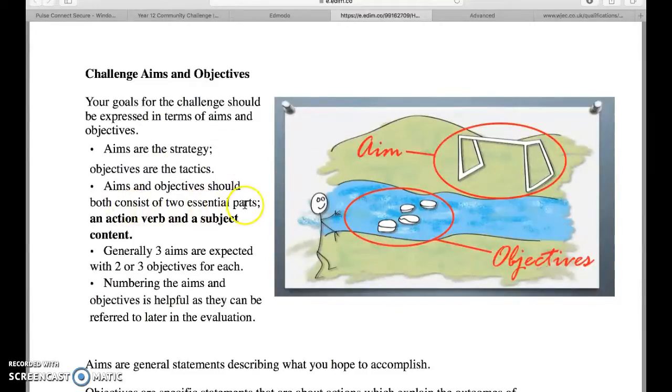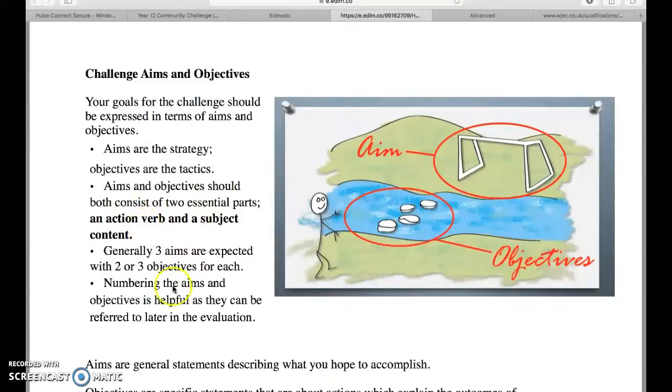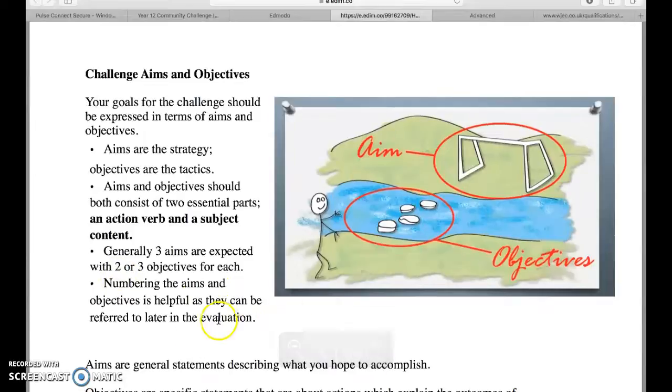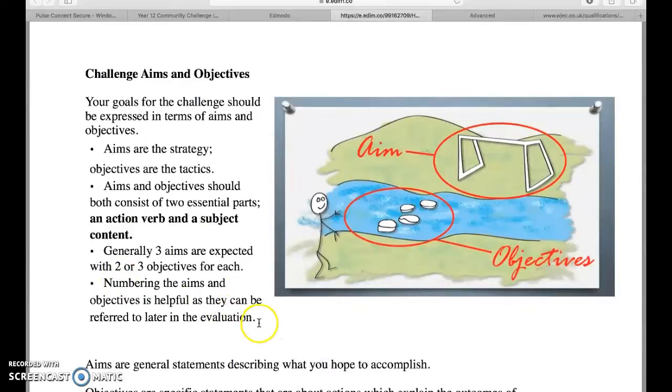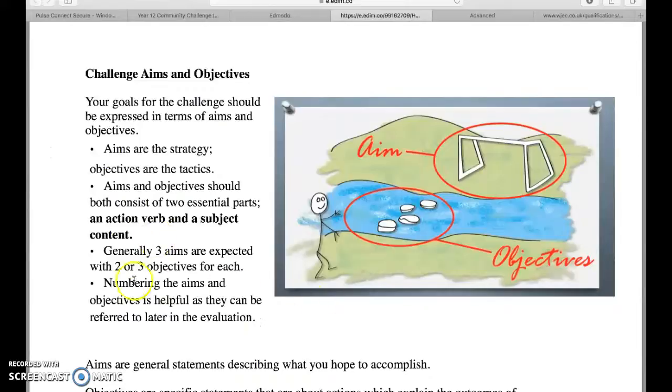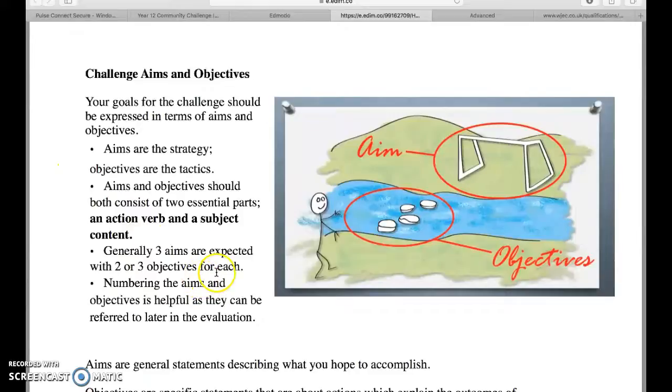Generally you'd have two or three aims and those can be broken down with two, three, four objectives within each aim. They should consist of two essential parts: an action verb and subject content. Numbering them is again useful, it's really good when you come to evaluate later on.